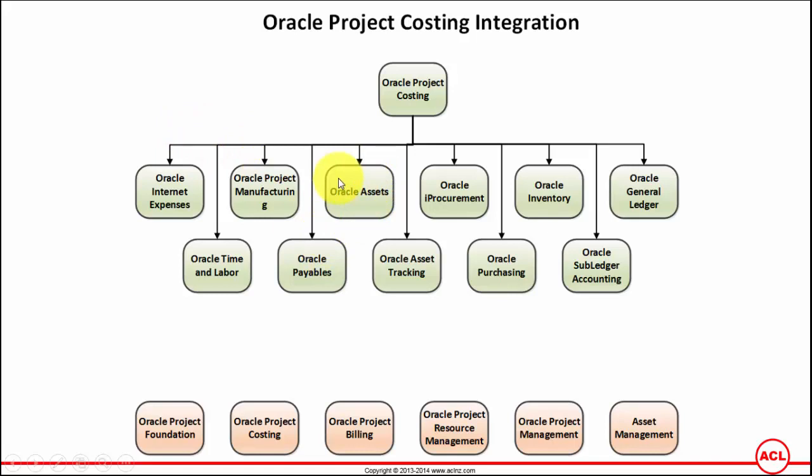For items that you have purchased from purchasing which are assets, they can be transferred to Oracle Assets after they have been paid. While the purchasing is happening, you give a reference to the project, so they are project-related items. A second integration is that you can define construction-in-process assets in Oracle Project Costing, and once you are ready to capitalize those assets, you transfer them to fixed assets and the costs incurred are captured within Oracle Project Costing.